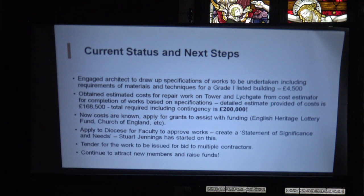Yeah, John. You mentioned the cladding, the vertical cladding was oak. The shingles are going to be oak? Material, oak, yeah, that is the plan. The whole thing is going to be oak. So the cladding is oak, and at the moment the shingles are going to be oak. But I think it will depend on when we get the quotes back. We'll probably get 2 quotes, cedar and oak. And we need to get the architects to confirm what they recommend as the best. Because, as you're probably aware, there are differences between the cedar shingles and the oak shingles in terms of life, and there are some cost differences as well, but also lifetime. Some say that the cedar shingles attract woodpeckers and birds like that. So it's a bit of a black art really to decide which one to use. But we can make that decision together with the architects.